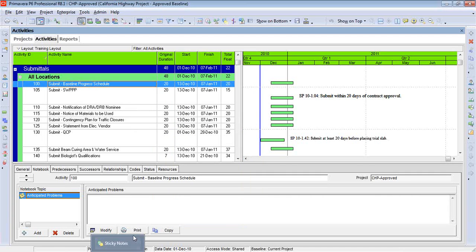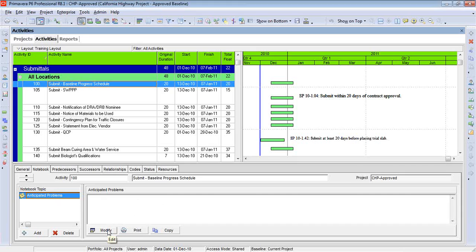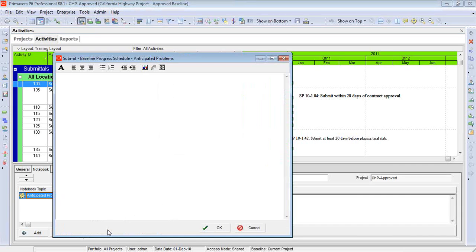Then the next step is that we have to type in whatever comment we want to make under that category. Now, if you're using an older version of Primavera, you can just start typing right here by putting your cursor on the right side of the screen. Starting with version 8.0, we have to click on the Modify tab, and then we can type. And there we go.